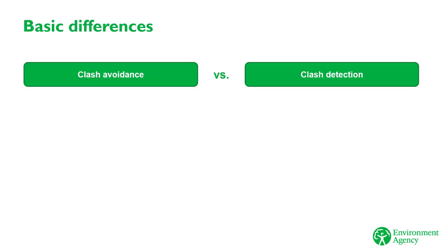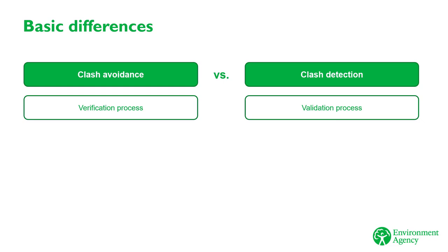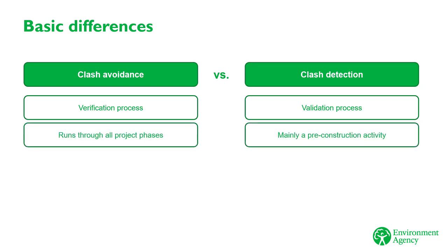Clash avoidance is a proactive process to identify potential clashes before they occur. It is a critical step in the designer workflow to avoid clashes within their own model files and systematically develop clash-free models ready for coordination with other disciplines. To do this, they leverage the authoring software, which has set parameters to identify where a potential clash will occur. Whilst the software offers solutions to avoid clashes, it is not to say the design model is completely clash-free when it is federated into a combined model file.